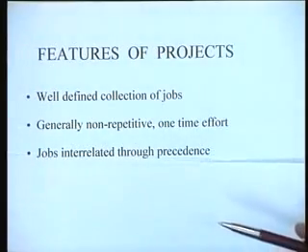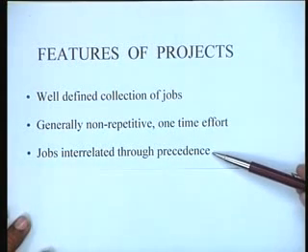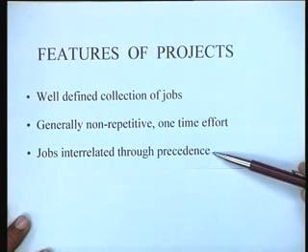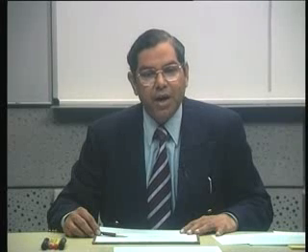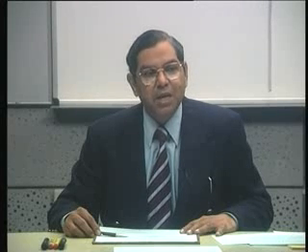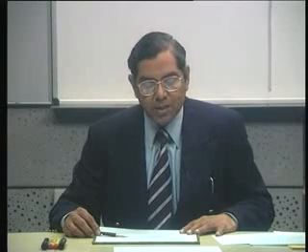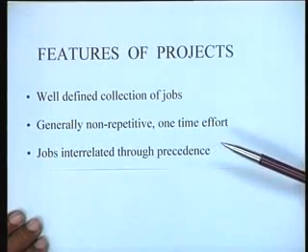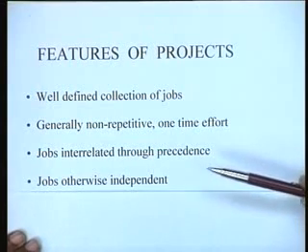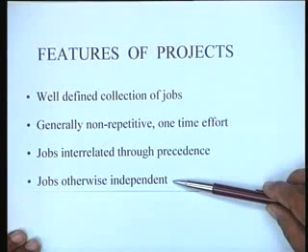These jobs which we are talking about are essentially interrelated, but through precedence. Now, the notion of precedence is very common and generally well understood. For instance, you cannot do the brickwork for a house until the foundations have been completed. So in that sense, doing the foundations becomes a predecessor for doing the subsequent brickwork. Similarly, in all projects, jobs are interrelated through precedence, and precedence is an important thing in trying to plan project execution. Otherwise, the jobs are independent.